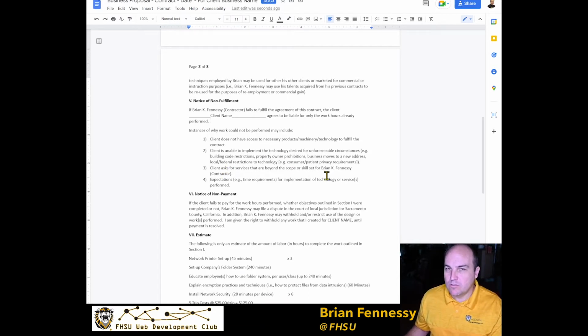In other words, when I worked with one dentist, I didn't understand HIPAA compliancy entirely. So before I started working with them, I said, give me some time to understand HIPAA, and that'll save you some money because I'd have to charge you hourly. But it'd be advantageous for me to do it because I'm going to be able to work with other medical professionals. So in that instance, you may put things on hold until you have the skill set to fulfill the contract. And you can always fulfill the contract for a smaller agreement, such as just building their website, and other things could come later.